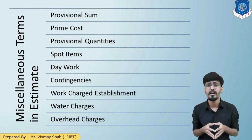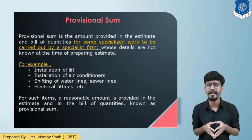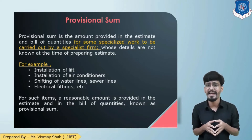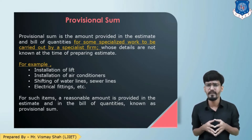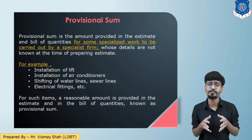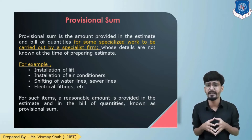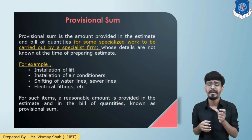Let us begin with the provisional sum. It is the amount provided in the estimate and the bill of quantities for work which is to be carried out by some special contractors, and their works are of some special nature. For example, installation of lift, installation of air conditioning, or some of the major electrical fittings. These are works to be completed by the specialized contractor, and we are not aware about certain details of it while preparing the estimate. So we can provide a provisional sum for such kind of work.